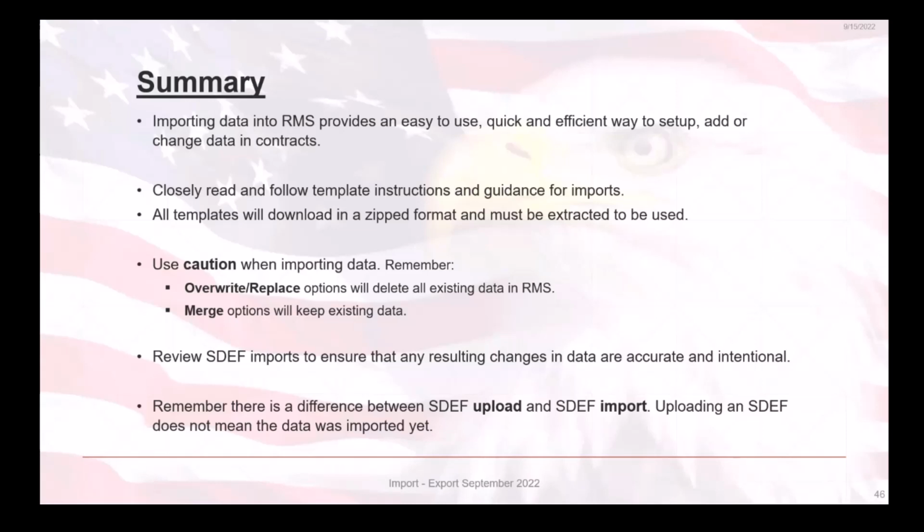Please remember that the Overwrite Replace option will delete all existing data in RMS, whereas the Merge option will keep existing data. Review SDEF imports to ensure that any resulting changes in data are accurate and intentional. And lastly, remember there is a difference between SDEF upload and SDEF import. Uploading an SDEF does not mean the data was imported yet.